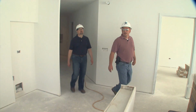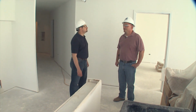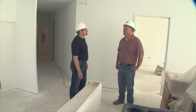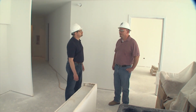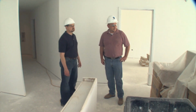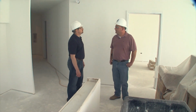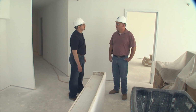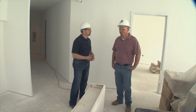Well, Bruce, you can see we've made a little bit of progression from up top. Sure. We're actually in the state, we've rocked the walls, all the MEPs are embedded, and we're final taped, and going into this project has 2 coats of paint, so we're coming in with the prime coat at this time. You see that we have some of the cabinets that have already been delivered to the floor, so once the painting's complete, we'll bring the flooring guy in. Flooring will go down, we'll start bringing cabinets in and going into finishes with tile and flooring. Okay, so that's the next step of the process here then? Exactly. Okay, great. Do you have a floor that's pretty much complete? We sure do. We actually have a mock-up completed we can go down to.